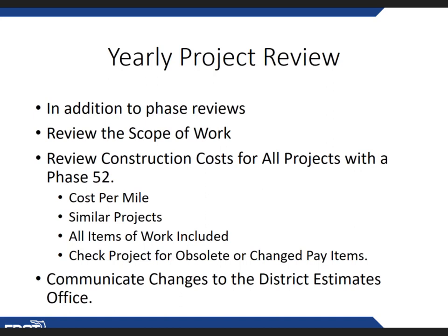FDOT is required to review our projects yearly. This is so that we can have a balanced work program. This review can occur anytime during the project's phases, but the process usually starts in the fall. Our office gets a calendar of when they want those updates done, so it's not up to us, it's up to the work program office, and usually up to the legislature, or when the legislature is going to meet.